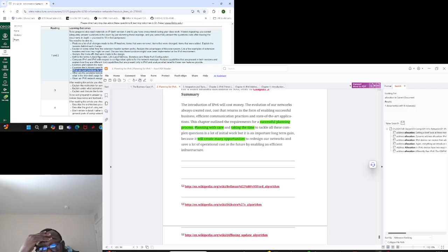So if you start from the core, not only do you get the advantage of working with low risk, but you also get the opportunity to leverage on the expertise of your ISPs who would have already deployed IPv6 in their core.